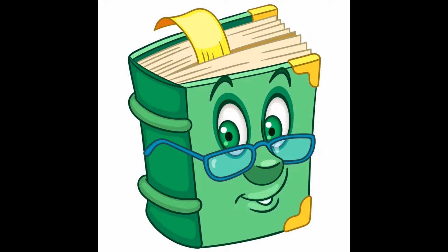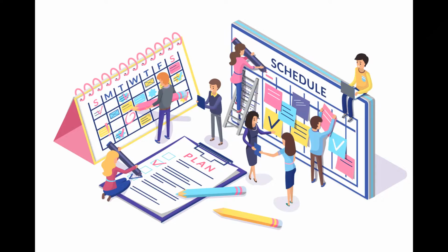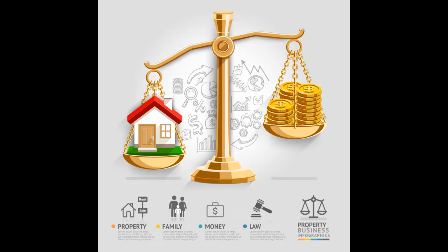The project management plan is the document that describes how the project will be executed, monitored and controlled, and closed. Project management plan components include subsidiary management plans. Scope management plan establishes how the scope will be defined, developed, monitored, controlled, and validated. Requirements management plan establishes how the requirements will be analyzed, documented, and managed. Schedule management plan establishes the criteria and the activities for developing, monitoring, and controlling the schedule. Cost management plan establishes how the costs will be planned, structured, and controlled.